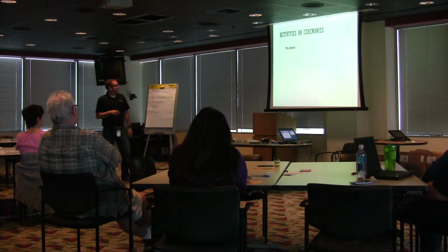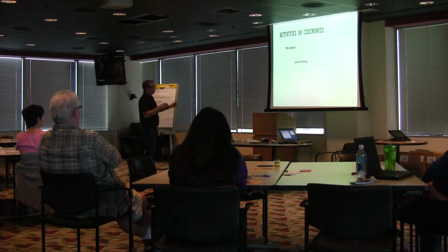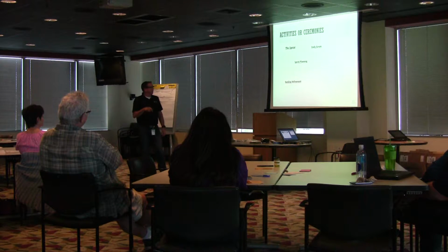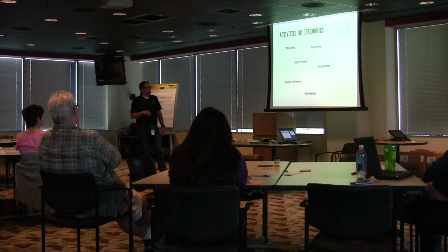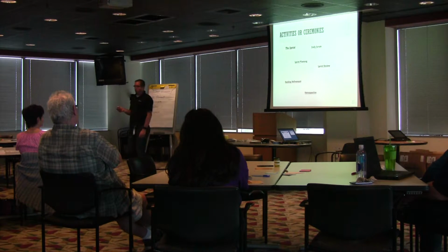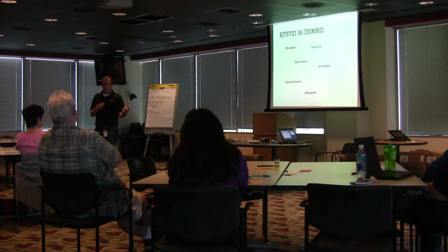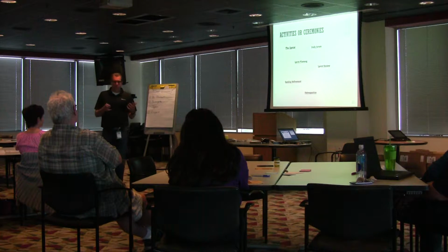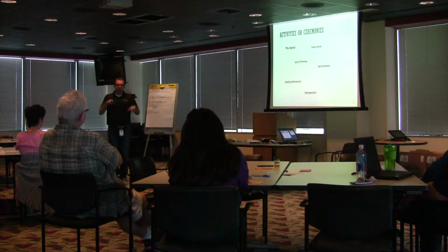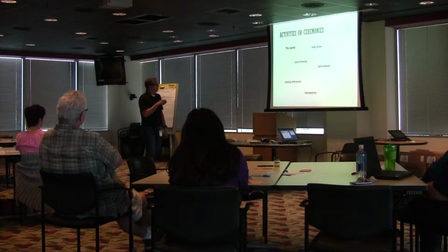So going through the activities and ceremonies, we've got the sprint. We talked about this on that one picture: sprint planning, daily scrum, backlog refinement, sprint review, and retrospective. So 5 activities or 6 activities. If you look at scrum.org, which all of our coaching is based off of, that document more or less, scrum.org doesn't talk necessarily about backlog refinement. So the official activities are these 5.